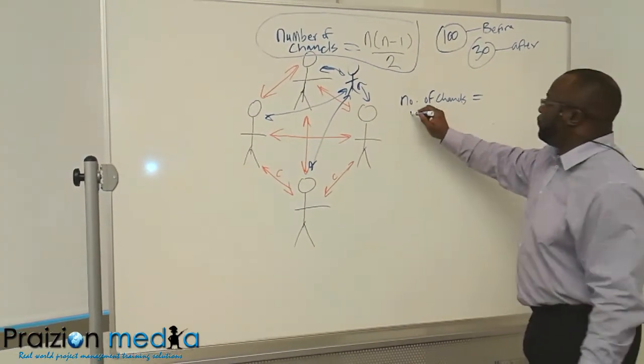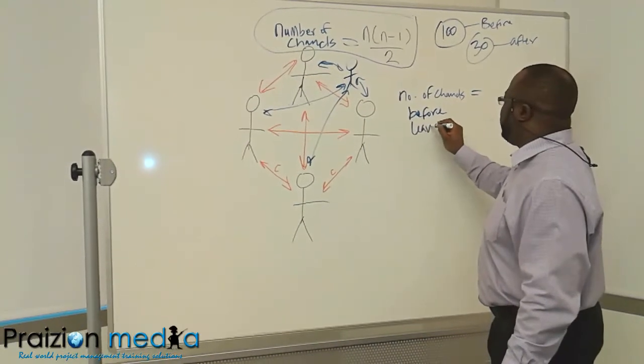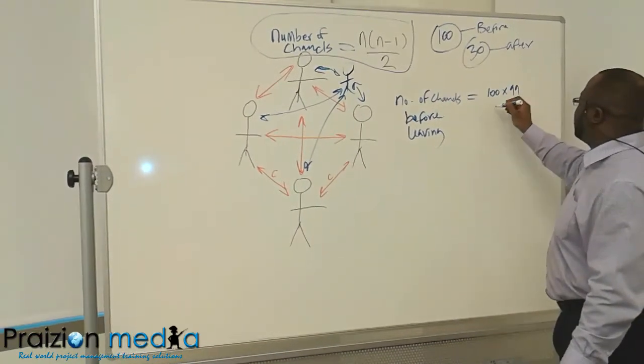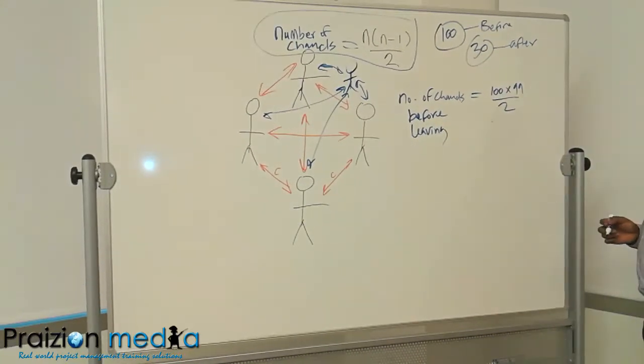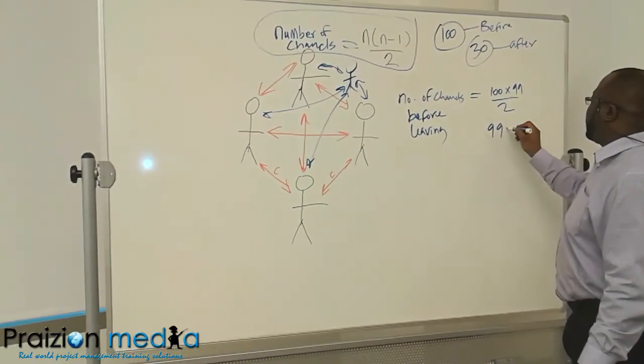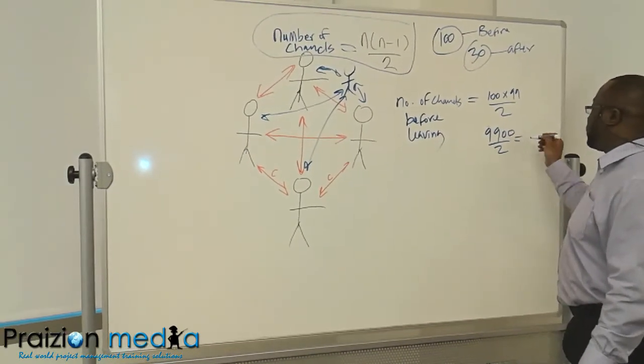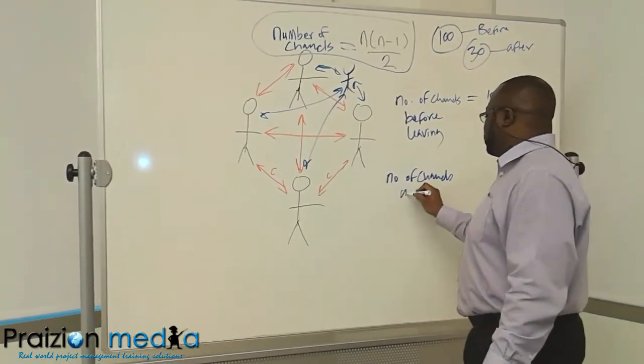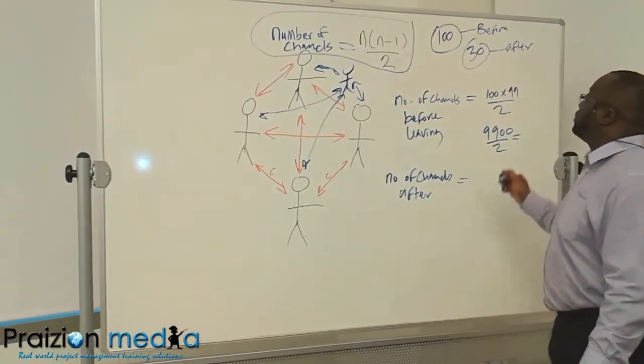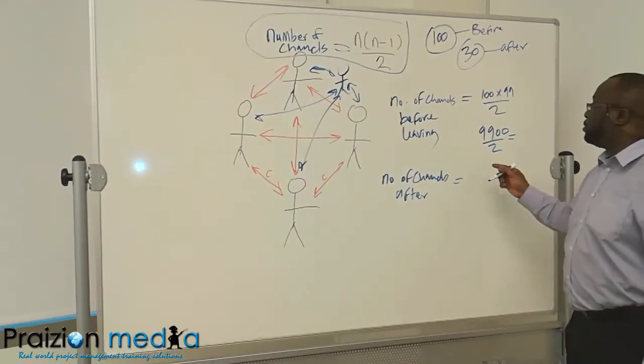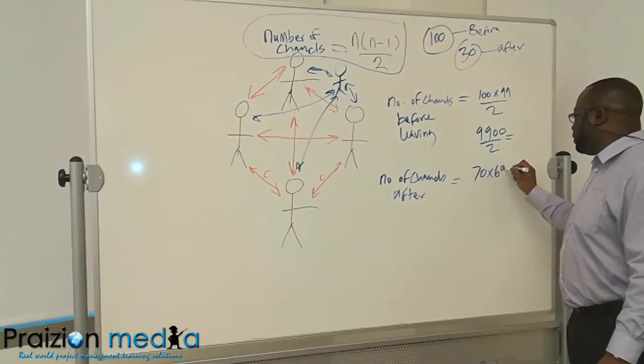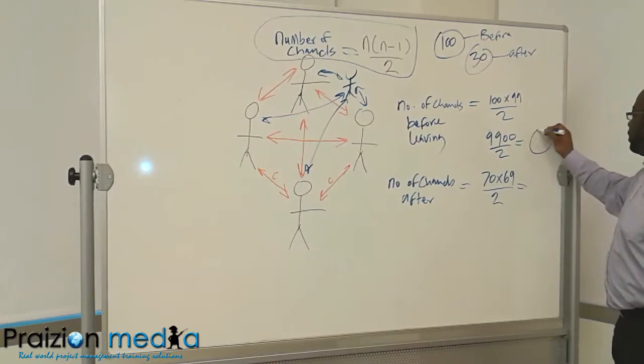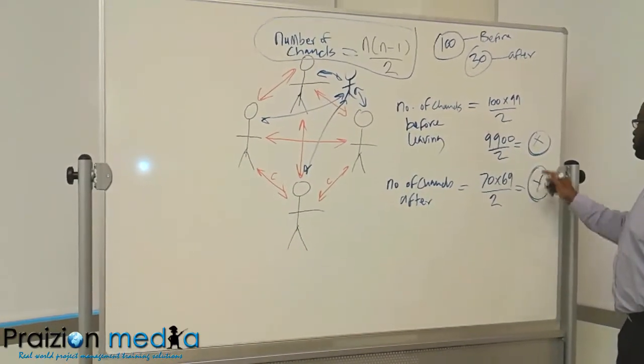So you would say number of channels before they left, before 30 people left, it's going to be 100 times 99 divided by 2. So this would be 9,900 divided by 2, whatever that comes to. And then the number of channels after is going to be what? 30 people have gone. How many do you have left? 70. So it's going to be 70 times 69 divided by 2.